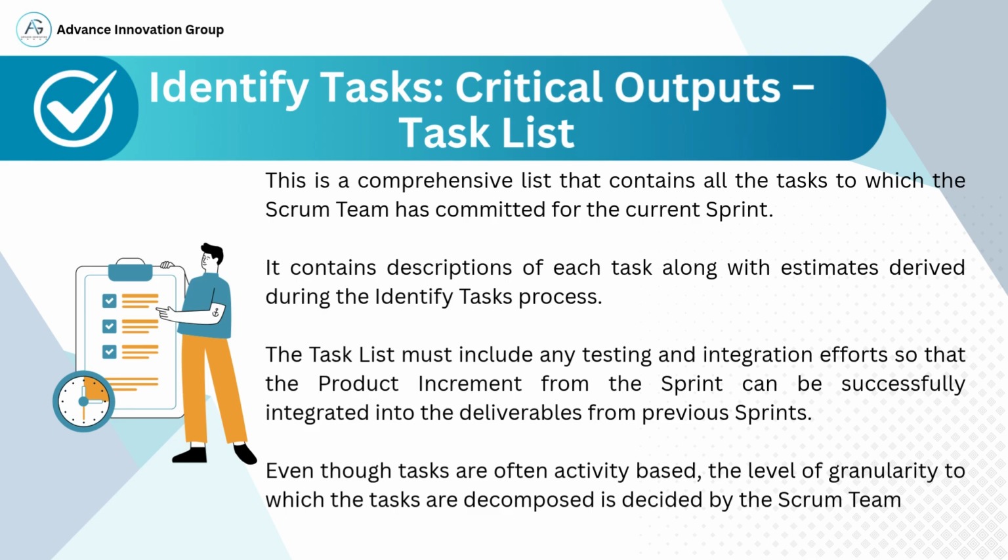Why testing and integration tasks matter. Scrum treats a sprint as a mini-project that must end in a potentially releasable product. If testing, integration, or environment setup tasks are forgotten now, they will become bottlenecks later and jeopardize the definition of done. Granularity. Tasks are often activity-based.